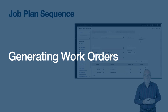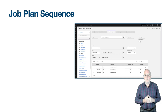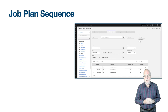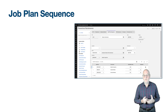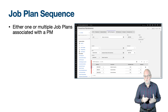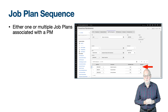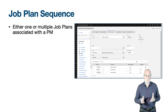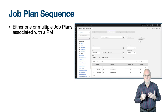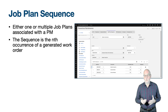Before generating work orders, we would normally associate the PM with one or more job plans. Job plans provide the information required for planning the tasks and resources needed to perform the work order — though a PM does not require a job plan. You can associate the job plan from the main tab, and for a new PM Maximo will create a record in the job plan sequence table with a sequence value of 1. In many cases there is just one job plan performed every time a work order is generated. However, Maximo supports sequencing of job plans where a different job plan may be attached depending on the nth occurrence of generating a work order.